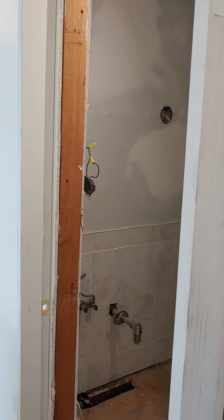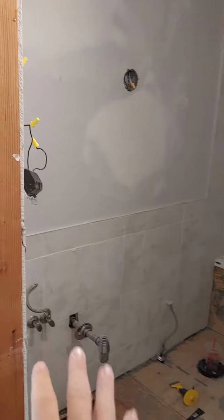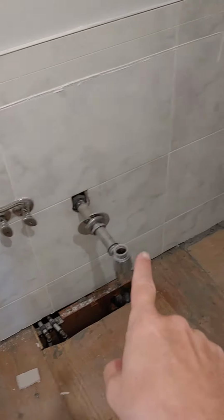Okay, the scope of work for tile setting for this bathroom, which is in a house in North Vancouver. We'll be climbing up to the second floor. That's the ground floor, main floor entrance. So these tiles will all be demoed out, and this entire wall will be tiled to the ceiling. So there'll be just one outlet, 2 octagon boxes, and the standard plumbing to tile around.